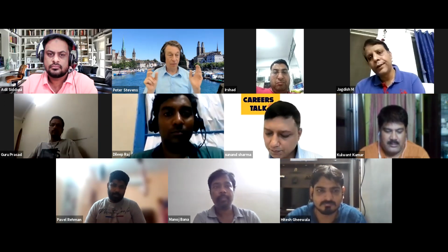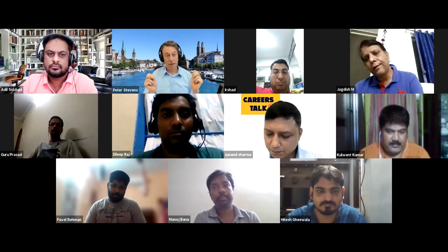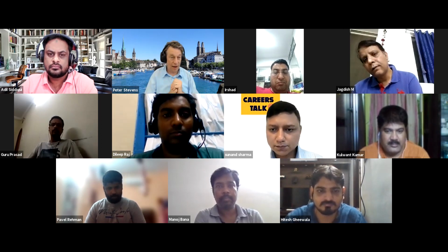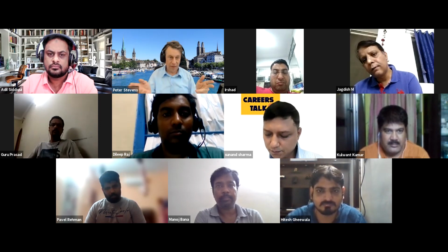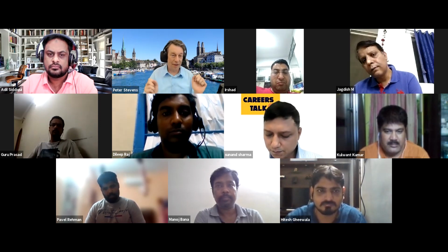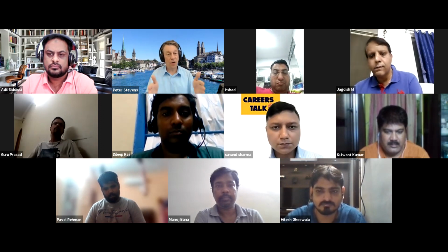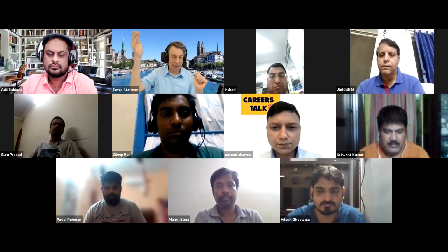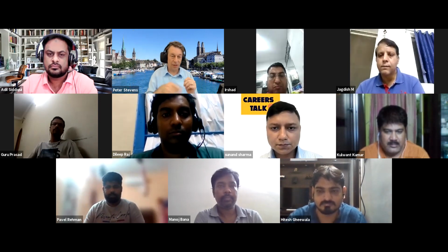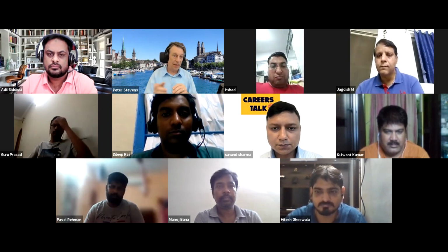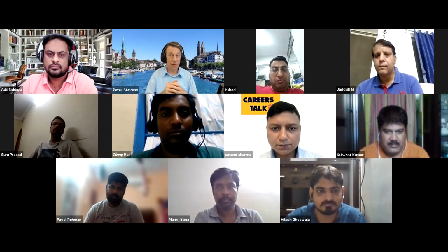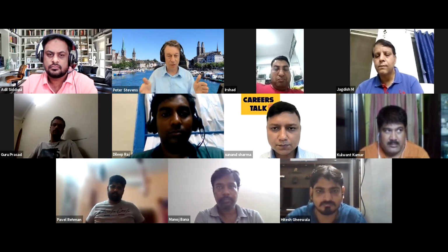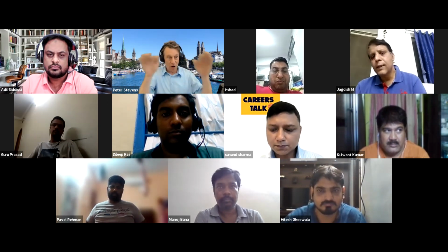Then we say, okay, we've got 6 people in the team. So that means 6 people times 40 is 240 hours per week. For 2 weeks, that's 480. Let's round it up to 500 just to make it easy to talk about. So we know that our team is 500 hours for a sprint, and we know that it costs, I don't know, let's say $100 an hour. So 500 times 100, we're up to $50,000 for a sprint. Again, I have no idea what the actual numbers are. They could be higher or lower. That's now a fixed cost.